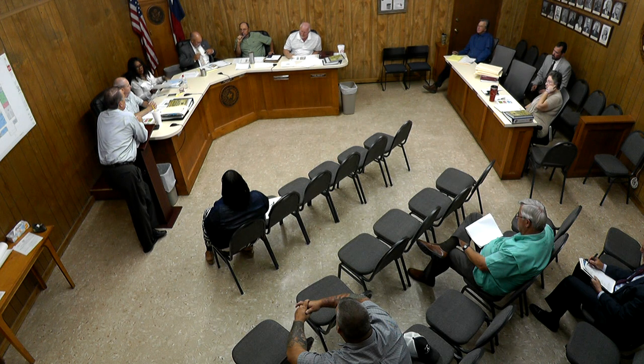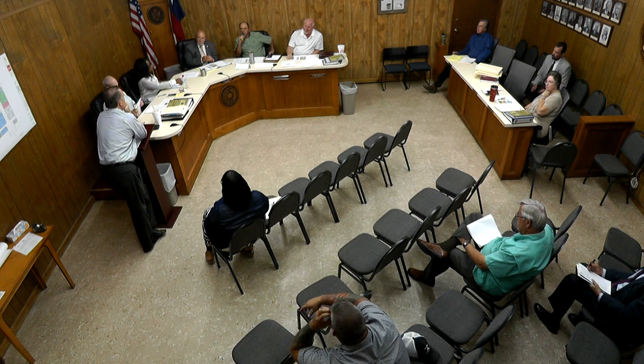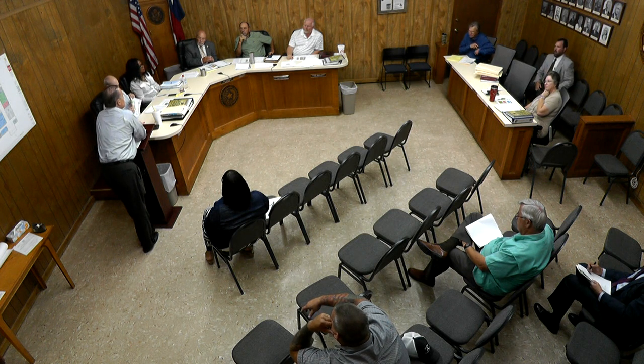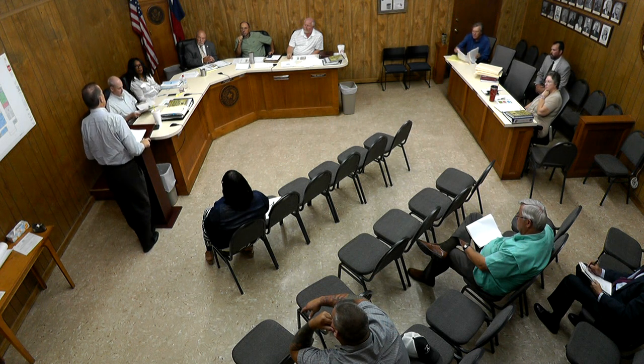We've got a courthouse already. You can apply brick to it. But then you're probably at about the same price as you would be with a prefab metal building as well, or is it? I'd say a metal building is cheaper than a tilt wall. I think of prefab metal building, then tilt wall, and then steel frame and brick veneer.